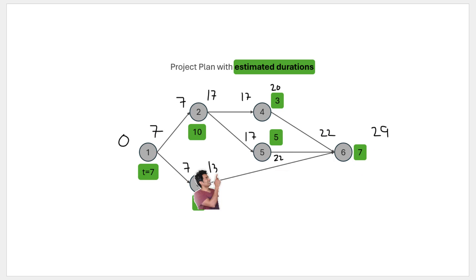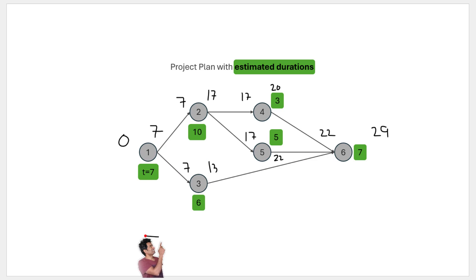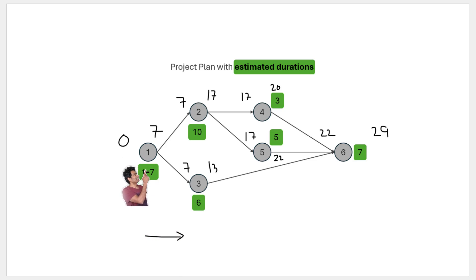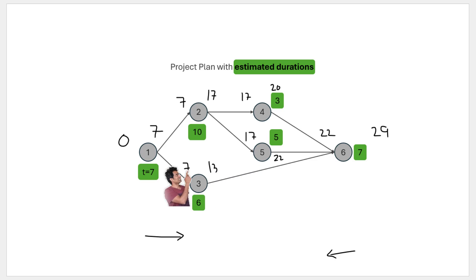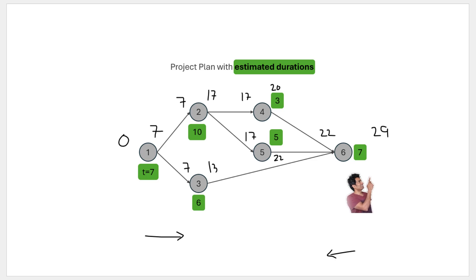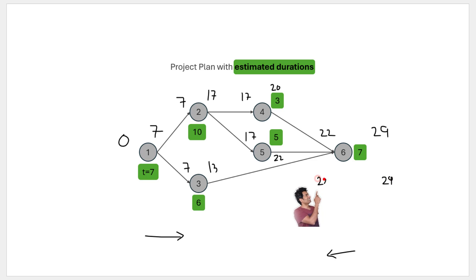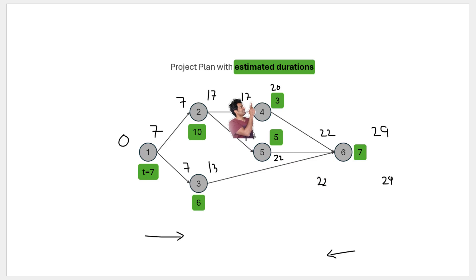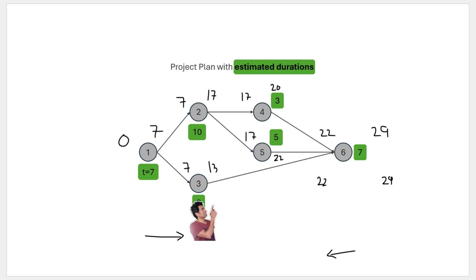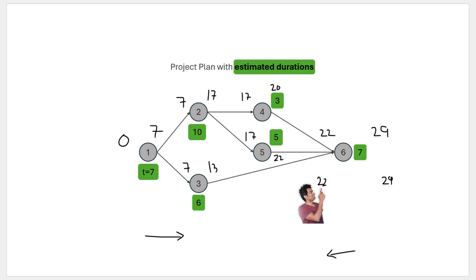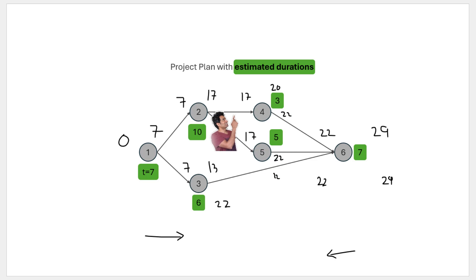Just as we have done earliest, we can also calculate the latest an activity can finish. This is where the passing will be not in the forward direction. This is called forward pass, where we go from the start of the project until the end of the project. We do a backward pass. This is when we start from the end and then we go back in time to see when is the latest an activity can begin. So the latest activity six can finish is the same as the earliest it can finish, so it will be 29. This side, it will be 22 because it takes seven days. And then we start going back in this direction and calculate what is the latest each activity can finish. So the latest each of these activities can finish is on day 22 because this guy has to start on day 22.